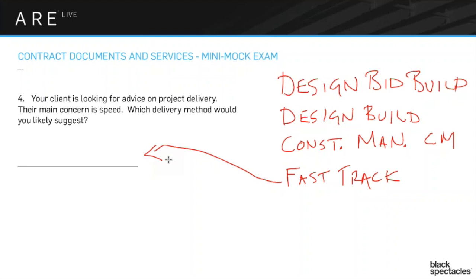That said, the extra expense may still be less than the total cost savings. On a very expensive site — like in the middle of Manhattan — it may make sense to spend $500,000 extra doing it fast track in order to get the building up and running faster, because you might save more than that $500,000 in loan costs. So among design-bid-build, design-build, and construction manager, fast track is clearly the answer when speed is the priority. It's not particularly common in practice, but it shows up on the exam because it's such a specific concept and an easy one to ask questions about.